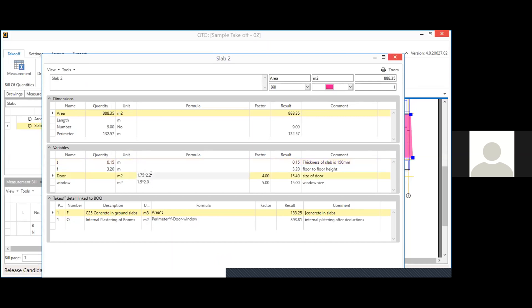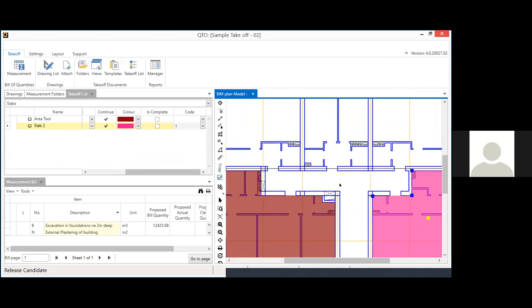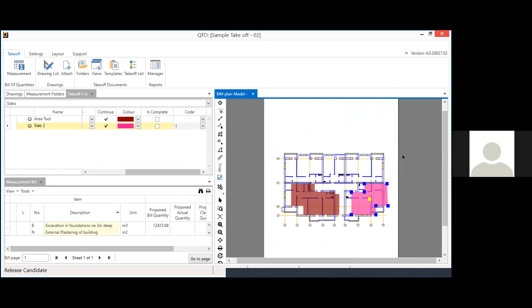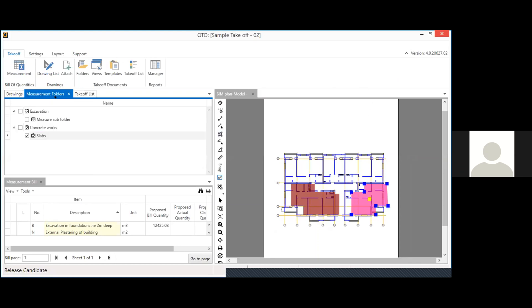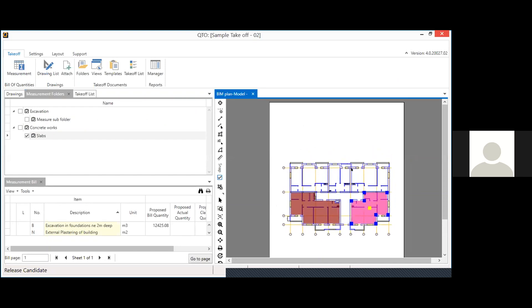If a parameter changes — say the door size changes from 1.75 to 1.5 × 2.1 — you update just one variable and all corresponding quantities update automatically. In this way the QTO module helps you quickly estimate quantities from all drawings. It can handle multiple drawings, and a 3D takeoff feature is also coming soon.